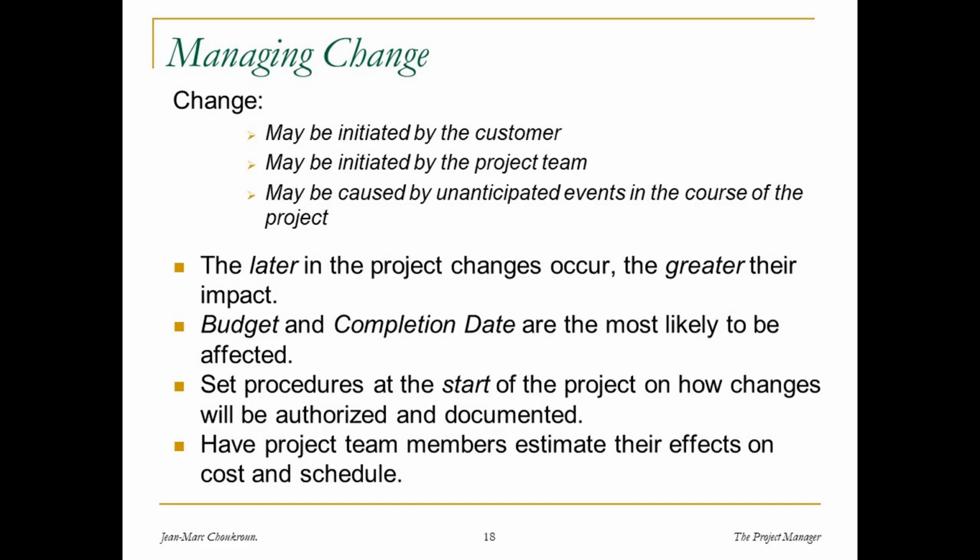So the main thing about change in the way we manage the project is that, and that's pretty obvious, the later in the project changes occur, the greater their impact. Therefore, we want to address as early as we can the things that may lead to significant change in the project, so that we can, in some sense, freeze them. So, managing change is an important function of a project leader, and while on the one hand you do not want to be dogmatic and say things won't change, on the other hand, there's a point in a project in which you can say, look, we are now committed to a particular course of action, and additional changes would certainly jeopardize significantly what the project is.